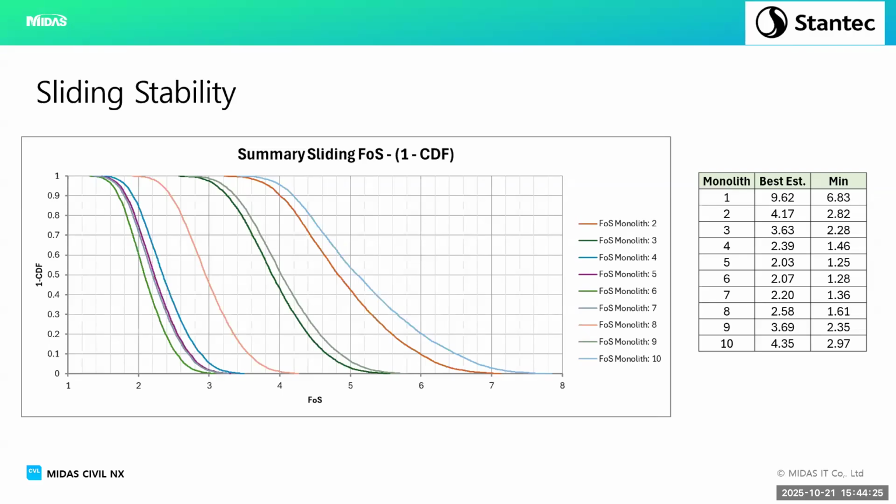In particular, one reason it's helpful is what's coming into play a lot more, and this comes to business decisions, is risk assessments. They are very advanced. You've got risk specialists that do this huge risk assessment, event trees, whether it be seismic, floods probably for Australia. And they've got these probabilities, and then eventually you do a seismic analysis. What I've seen in the past is you do your analysis under an event, let's call it sliding for an event. And then there's a table of may happen, would happen, will happen, and it's got a qualitative probability associated to that. So then you look at it and say, I have an idea that it would fall into this category, and that goes into the event tree.